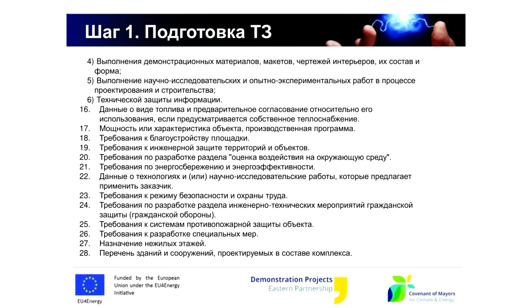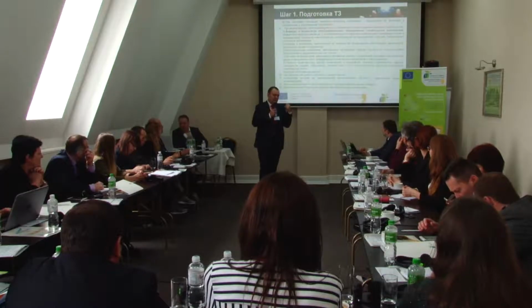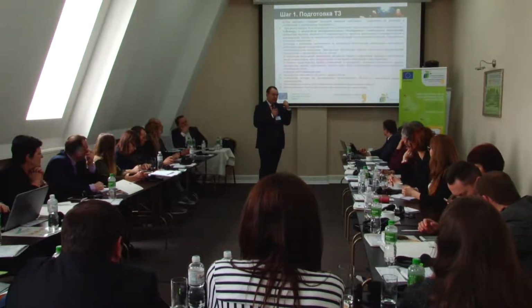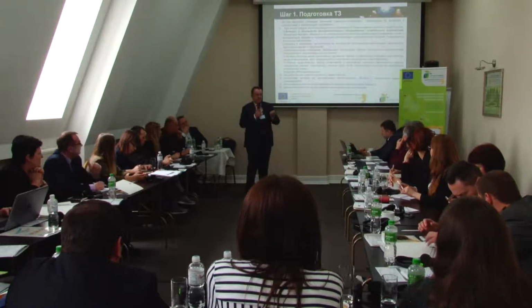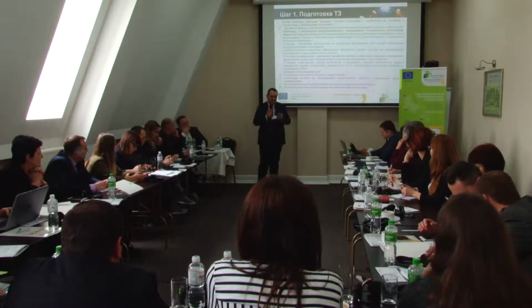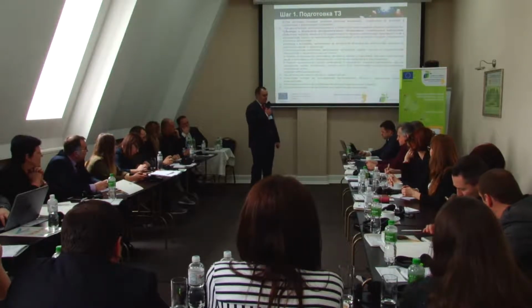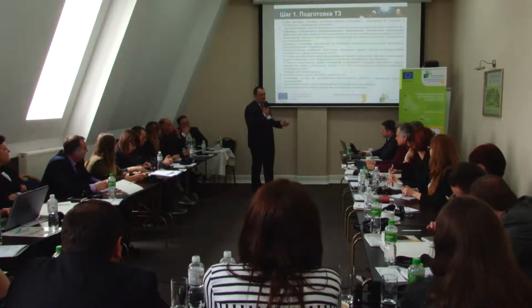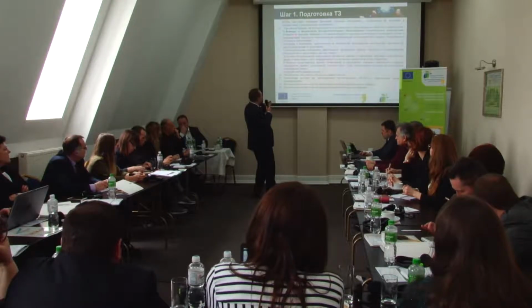And performance of this assignment, as Larissa has mentioned, requires that the whole team works with it. And it's okay that the project manager doesn't have the technical skills necessary for designing. That's why the technical assignment shall be prepared by a technical expert with good experience of developing such documents, and this must be an expert who has already been involved in the implementation of the project and has proper specific skills and knowledge.